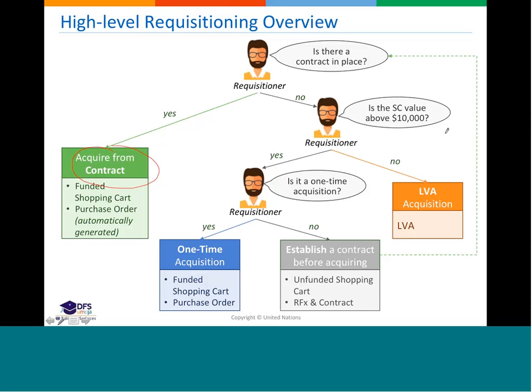So what we need to do in this moment is to just raise the formal request of a shopping cart, but in that moment, no cost center is going to be charged. This is basically a formal request to procurement in order to initiate the procurement process of the products that we're going to include in the shopping cart, but this shopping cart is not pre-committing or committing any funding at this stage.